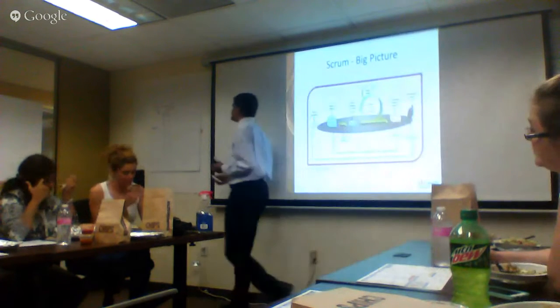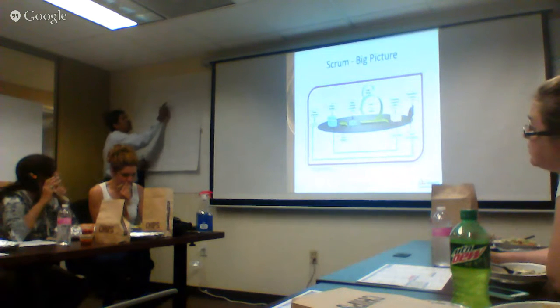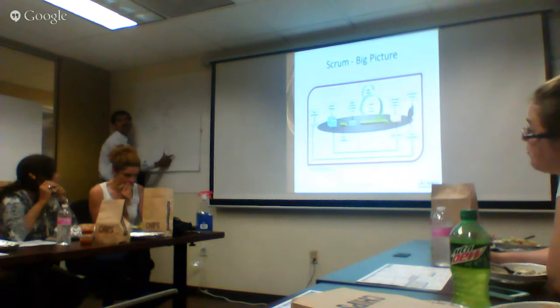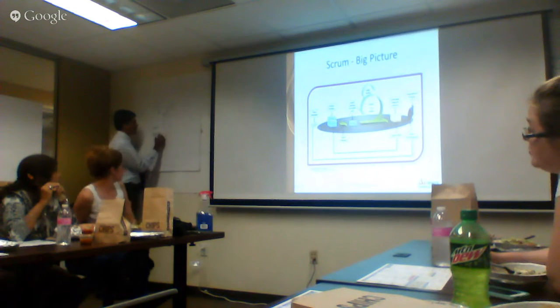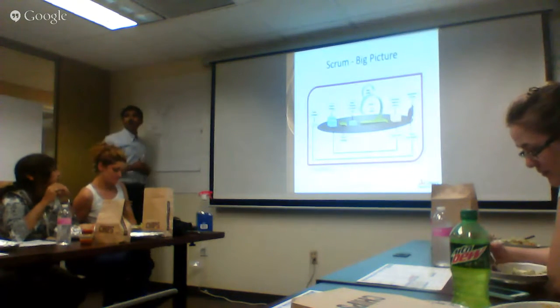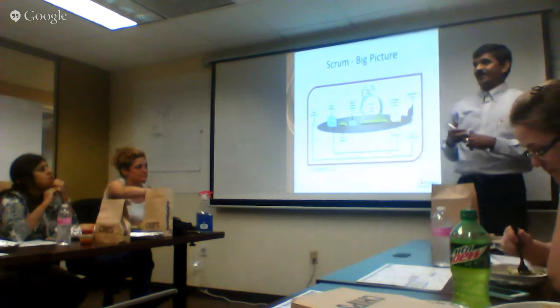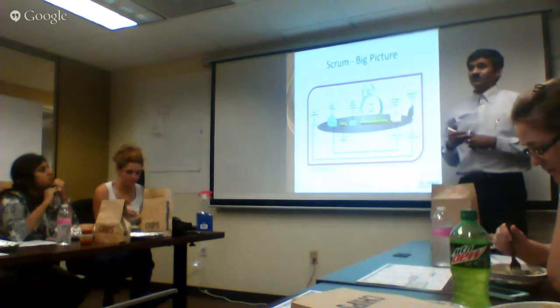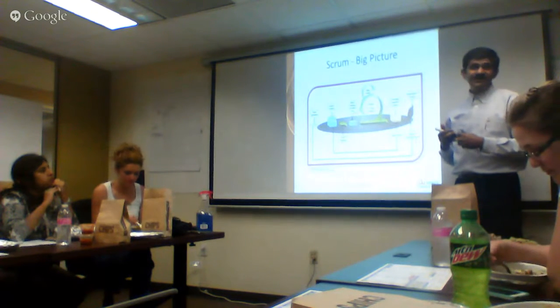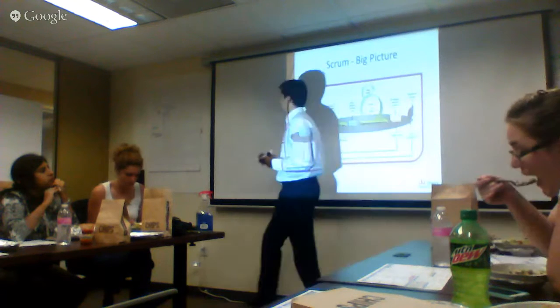Before we begin, we need an owner of this backlog. We call him or her a product owner. We have to have a product owner who owns this backlog, who prioritizes it, who has the money, who liaises with the customer, who represents the customer to the team. We need that person. That's the product owner.